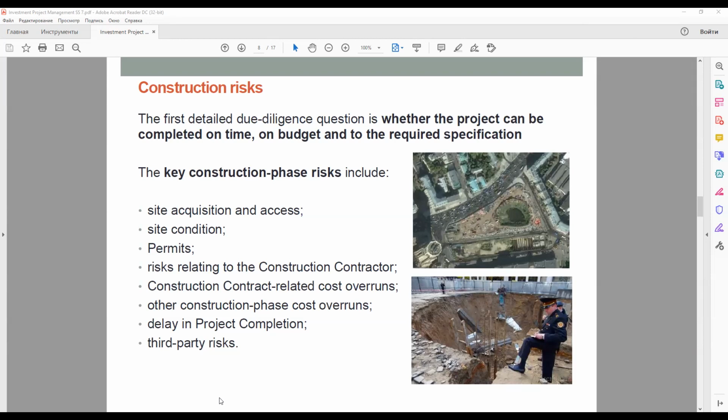Previous use. The way in which a project site has been used in the past may create risks for construction on the site. Lenders certainly prefer to see projects being built on a greenfield rather than a brownfield site. Previous heavy commercial or industrial use is one warning sign.